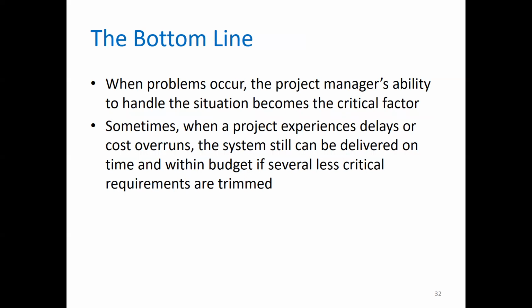The bottom line, when problems occur, the project manager's ability to handle situations becomes the critical factor. Sometimes when a project experiences delays or cost overruns, the project can still be delivered on time and within budget if several less critical requirements are trimmed. Now, in simple terms, what I had mentioned earlier, the project manager's ability to handle the situation becomes a critical factor. Now, with the ability comes experience.